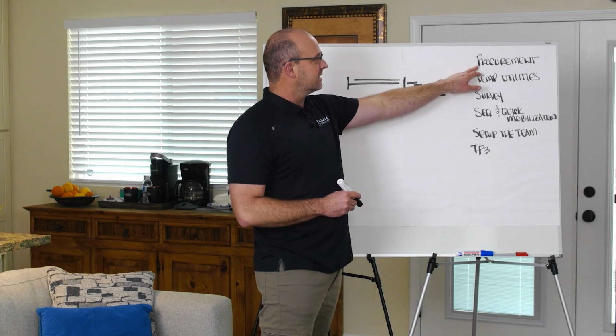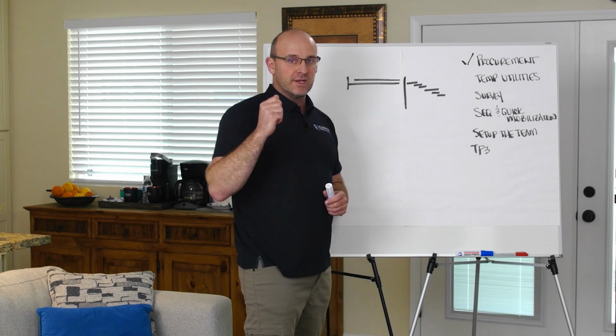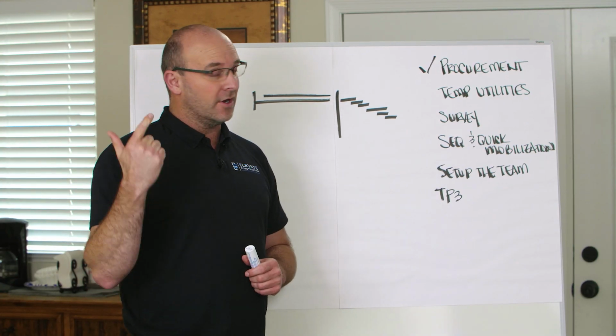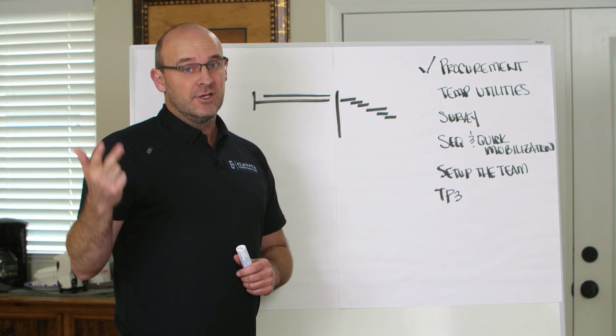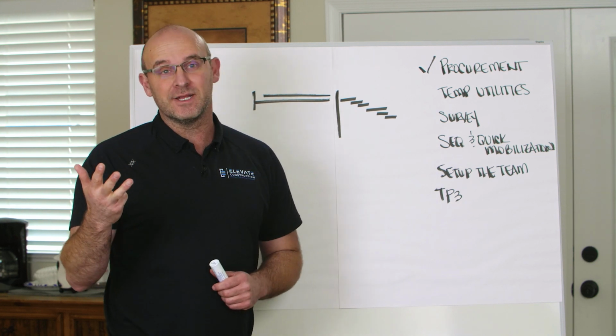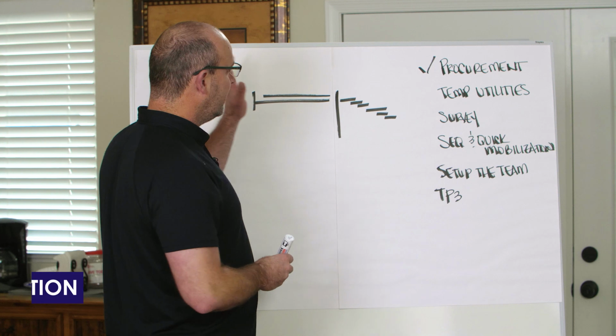So one of the first things that we need to look at is procurement, right? Do we have long lead procurement items coming on the way for the things that we need? So let's check it out. Obviously, you're going to have switchgear. Obviously, you're going to have air handlers. If you have curtain wall on your project, unitized curtain wall on your project, you're going to have to get that out. If you have tile from Italy, anything that's long lead, elevators, needs to be taken care of in pre-construction.